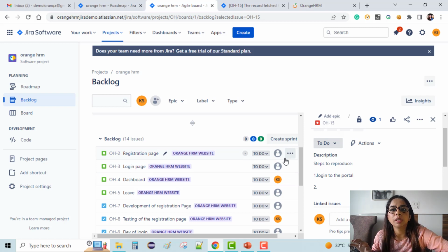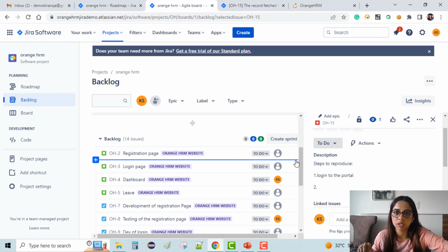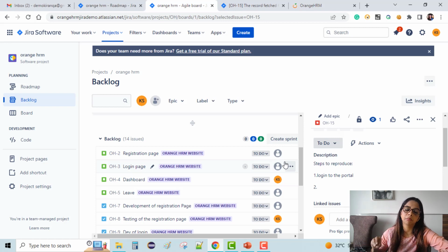All the teammates who are having stories in the sprint will mark the exact efforts they need to invest in completing a story. All those exact efforts will be marked in that issue, and we can have a collated number, and then we can work upon the sprint and see how many story pointers we have to achieve.